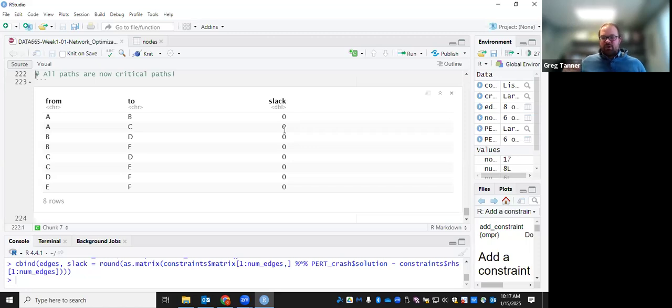The activities that were at the same stage in the overall process but were taking longer, we crashed those times so that they're now the same length as the task being done in parallel with it. That's the rule of thumb, or the conventional wisdom, if you're thinking of this without optimization: if you have multiple activities in parallel, you want to reduce the longest one so that they're more similar in time.